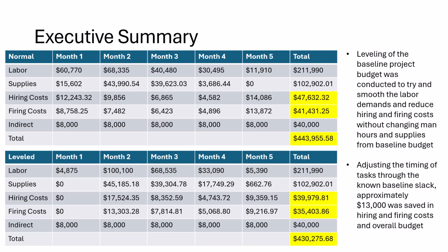The goal for the week was to level the resources of the previously presented refined baseline budget. The goal of resource leveling is to minimize the fluctuation in loading. In this case, the goal was to ensure the proper resources needed to complete all the tasks for the project were available in such a way as to reduce the refined baseline budget hiring and firing costs.